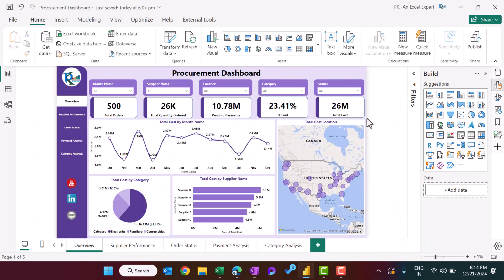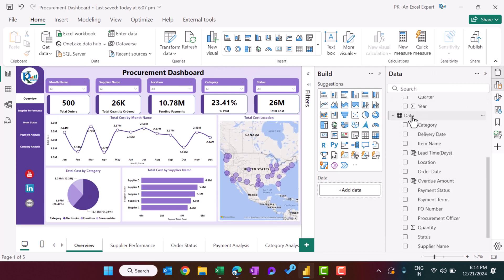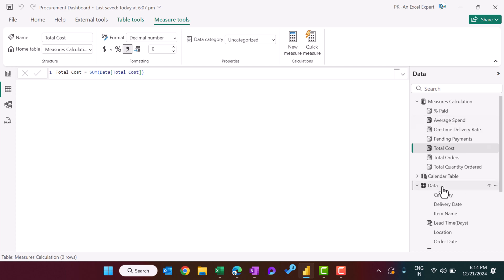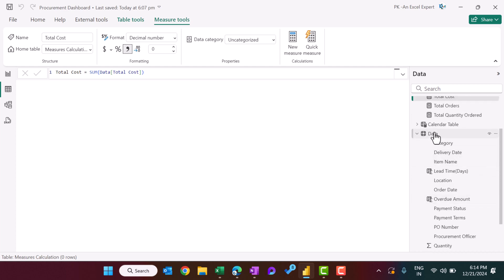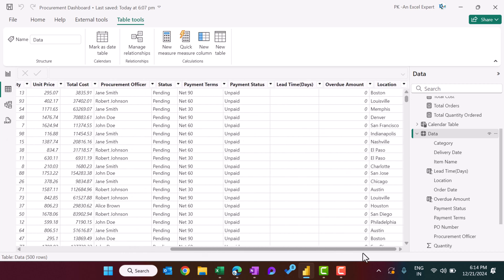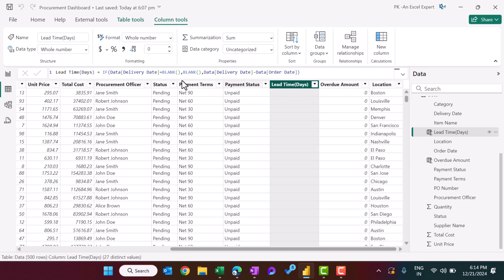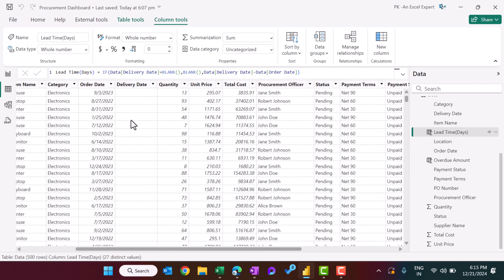This is the dashboard we have created. In the data view, this is the data loaded in the data table — the same data from Excel. We have added two calculated columns. The first is lead time in days: the formula is simply delivery date minus order date.